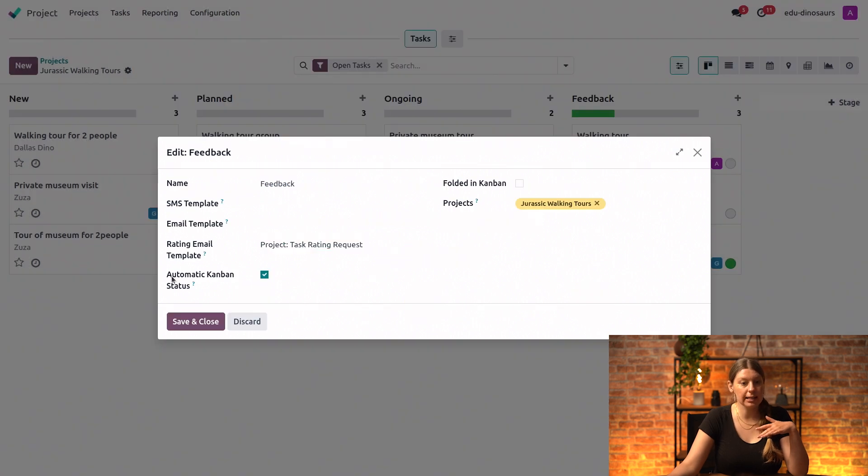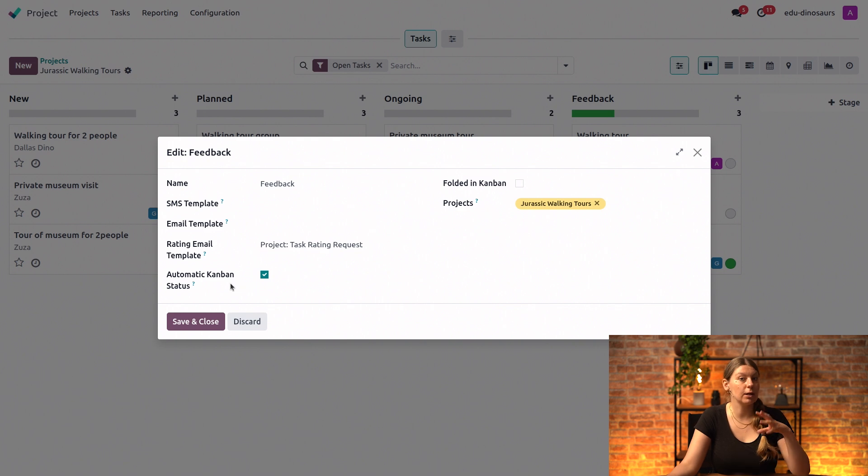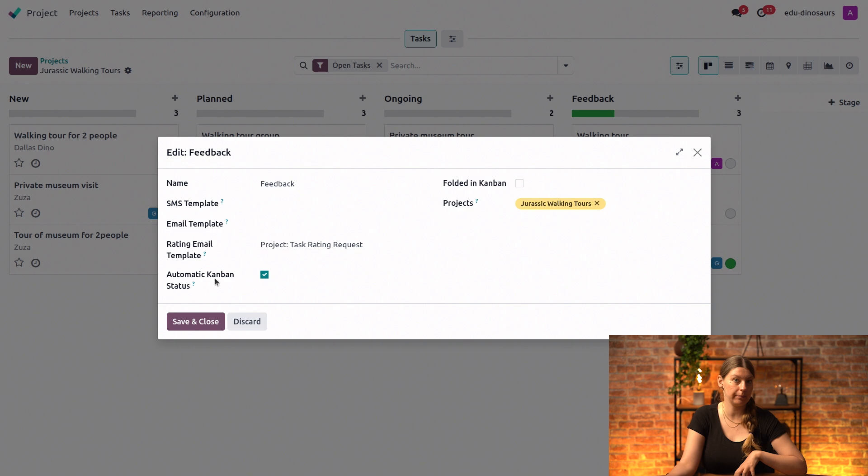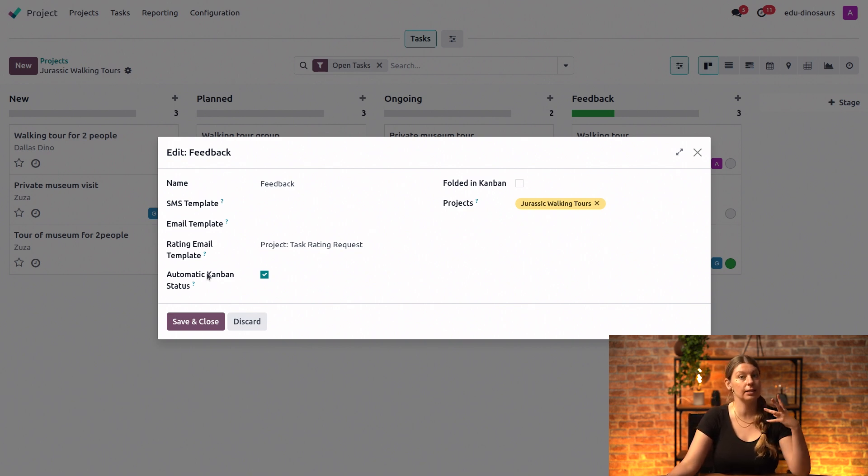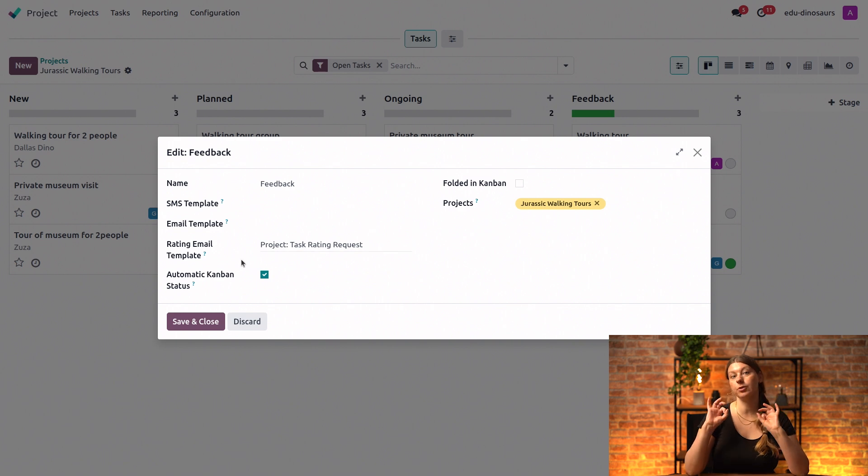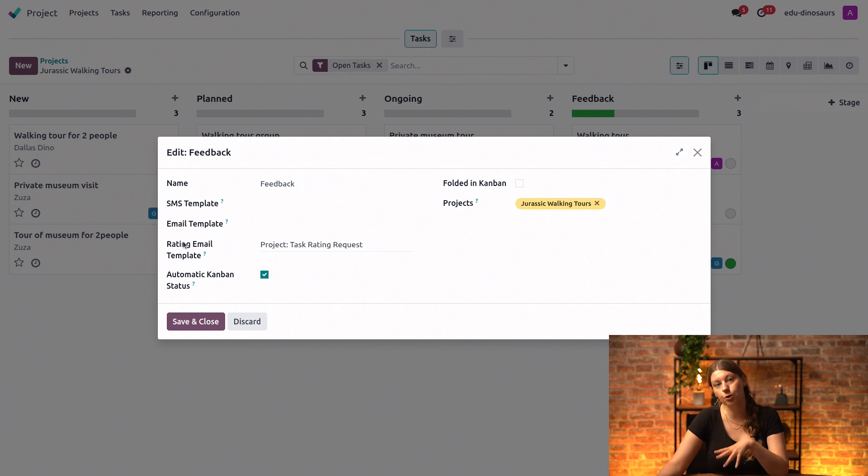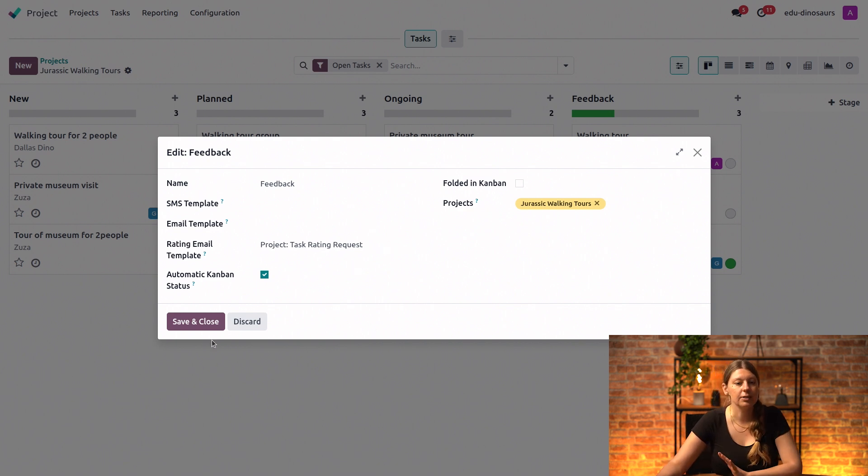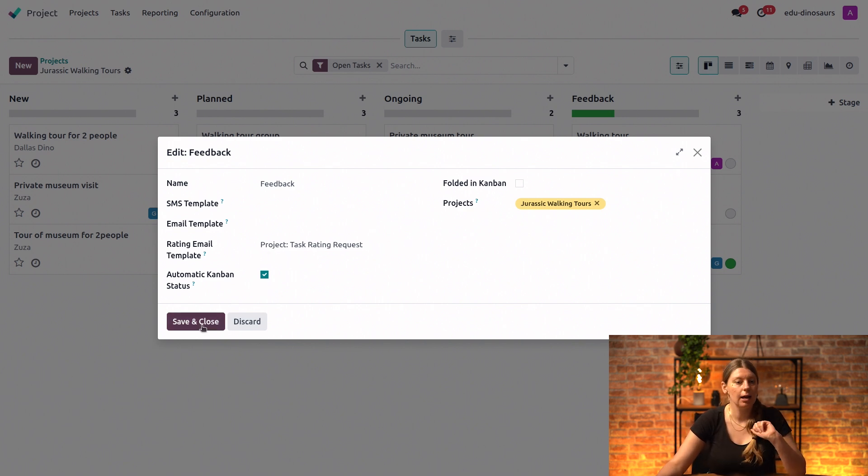And then next up, I have this automatic Kanban status feature. And this is a feature that once enabled, it will update the status of a task automatically depending on the client's feedback. So if a client gives good feedback, this will update the task status to approved with the green dot, while neutral or negative feedback from the customer will change the task status to orange dot slash changes requested. So I will leave this enabled because I like to be aware if my customers give negative feedback, and I will save and close.